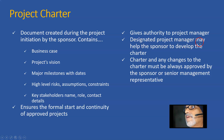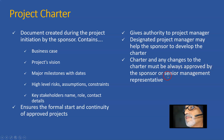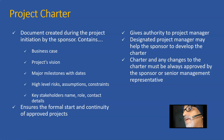A designated project manager may help the sponsor to develop the charter if it is not already existing. However, the charter and any changes to the charter must always be approved by the sponsor or senior management. A project manager can never approve a charter. And if there are any changes to the charter, it must be re-approved by the sponsor or the senior management representative.